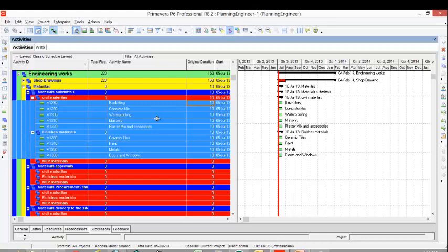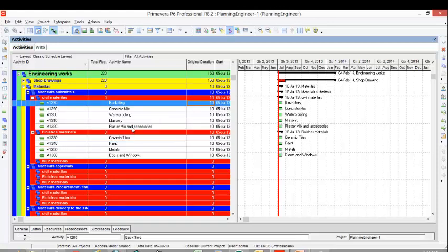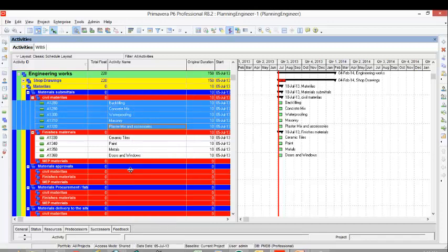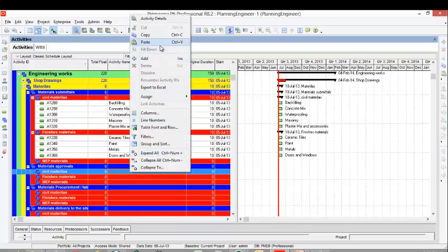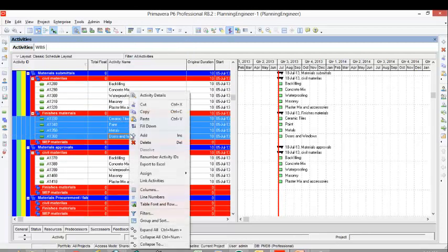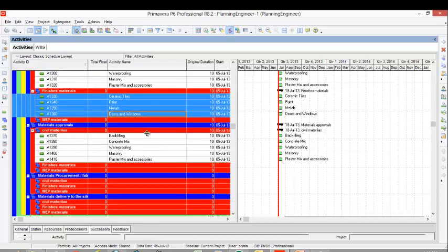The submittal, and we'll keep the same duration for the approvals. As I told you earlier, this duration should be confirmed by your technical department and according to your contract. In this case, you should confirm it from the procurement department. So I'll paste them here.